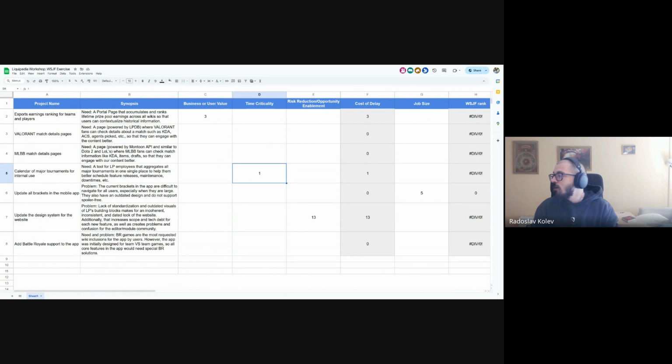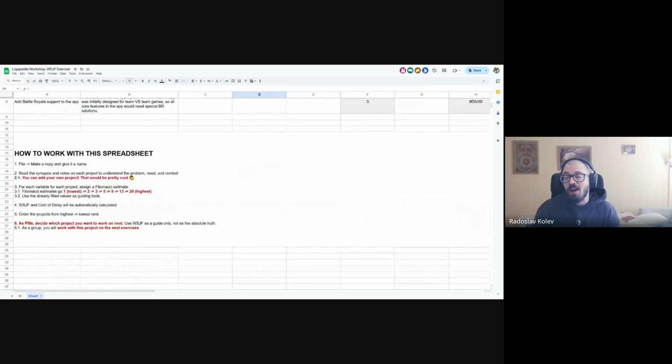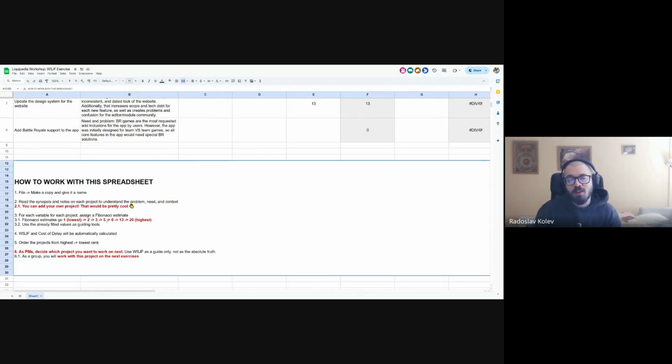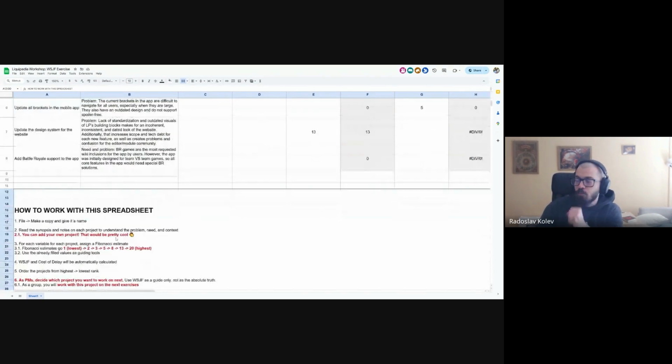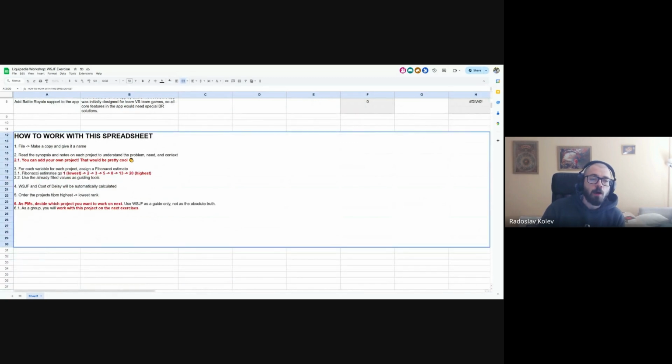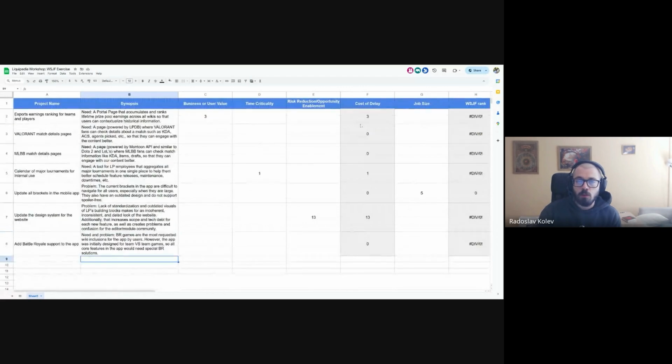Shouldn't it be 21? Yeah, that's why it's called modified Fibonacci. It's 20. And I think there are a couple of other numbers along the spiral that are kind of modified. But usually it goes 1, 2, 3, 5, 8, 13, 20. I think then it's 40, 100, and 400, usually if you go super bad. But if you're talking technical Fibonacci, it should be, I think, 21 and 34.